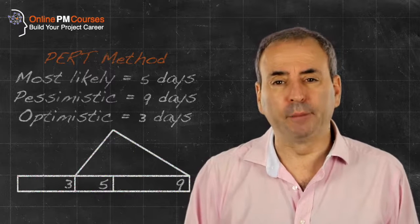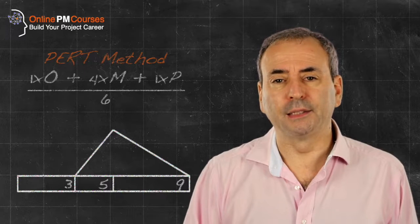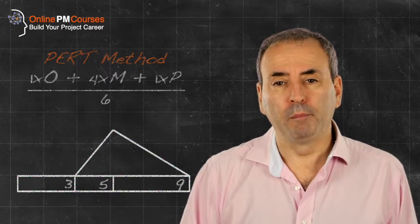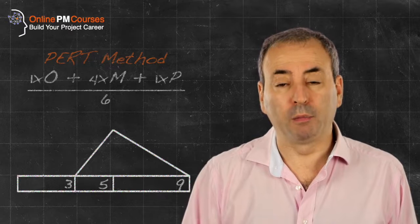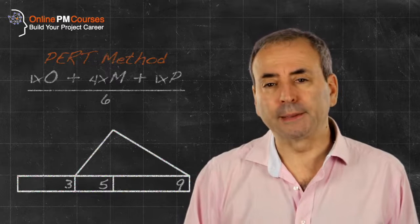But we don't give these equal weighting because there's a reason why the most likely is the most likely. So we give it a higher weighting. Typically, the PERT method suggests that we multiply both the optimistic and pessimistic by one and the most likely by four. We add them together and divide by six.